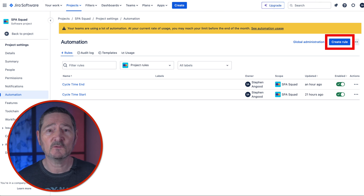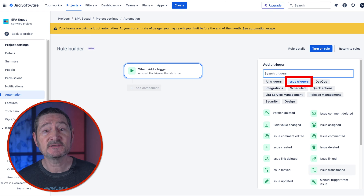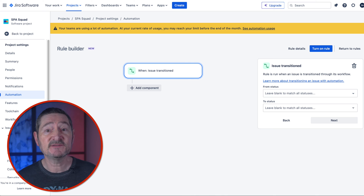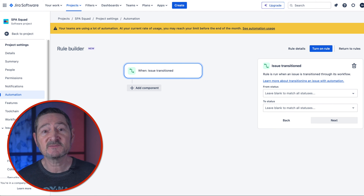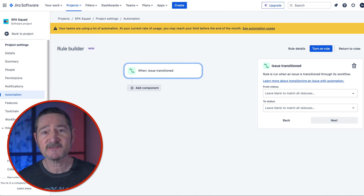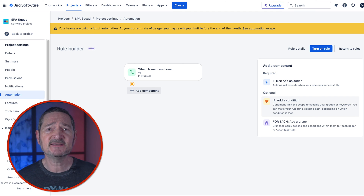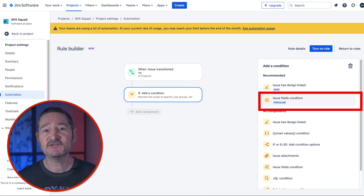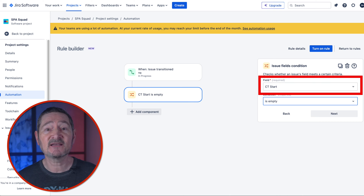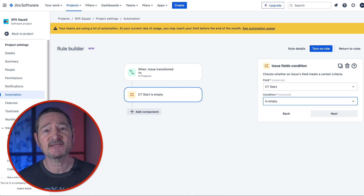So let's create our first rule. Click on Create Rule — you'll be presented with the rule builder screen where you can apply rules in the When/If/Then style. Click on Issue Triggers under Add a Trigger, then select Issue Transitioned. You'll see the issue transition box appear where you can select which transition you're moving to. I'm only interested in when a story transitions to In Progress regardless of where it's come from, so I'm only going to select In Progress in the To Status box, then select Next. Now we want to add an optional If condition — we only want to populate our CT Start custom field if it's never previously been populated. Click If Add a Condition, select Issue Fields Condition, select the CT Start custom field, and set the condition to Is Empty, because we only want the date entered if the story has never previously passed through In Progress. Then click Next.